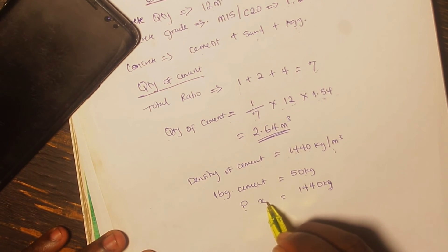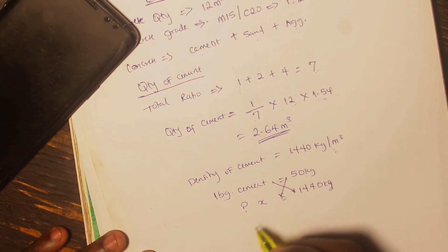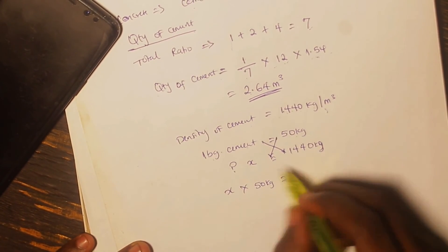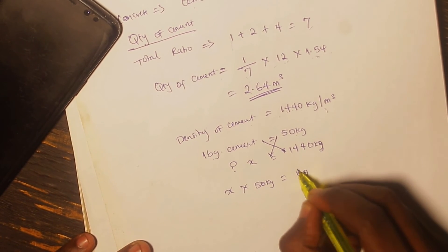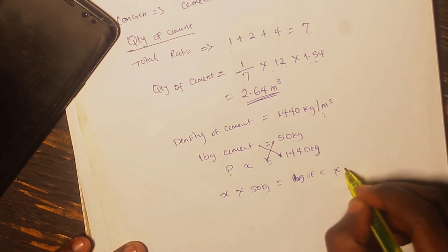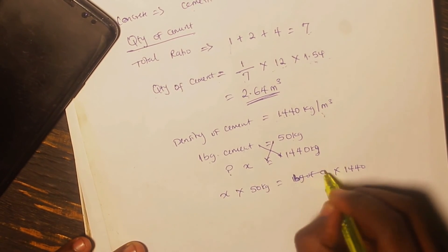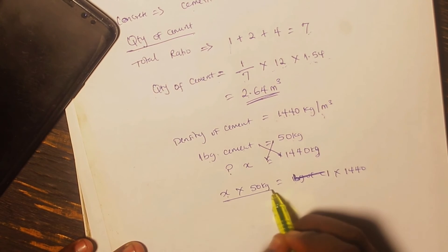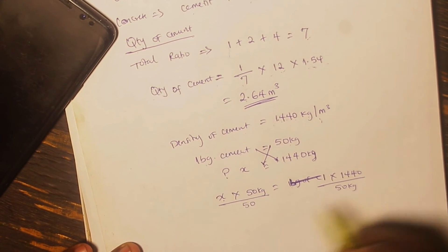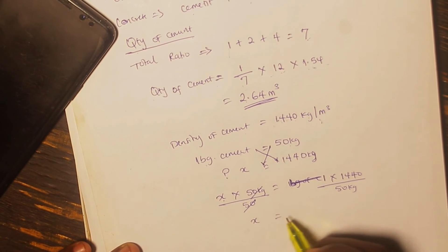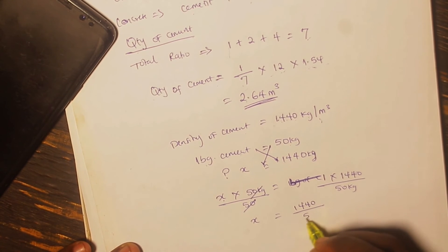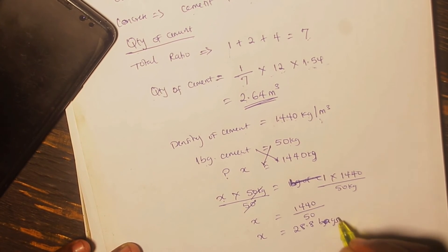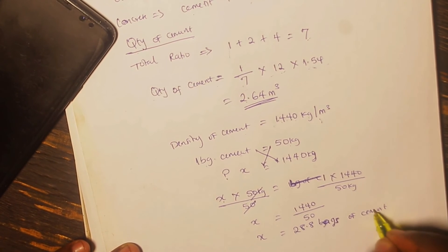One bag of cement — in Nigeria, whether Dangote or BUA or whatever brand — is equal to 50 kg. So if 1 bag of cement is equal to 50 kg, how many bags of cement will we get from 1,440 kg? Because the density of cement is 1,440 kg per cubic meter. Using basic cross-multiplication, X multiplied by 50 kg equals 1 bag multiplied by 1,440. Dividing both sides by 50 kg, the number of bags of cement becomes 1,440 over 50, which equals 28.8 bags of cement.